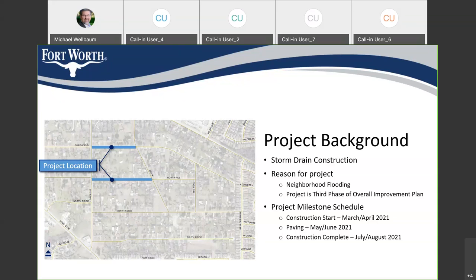This is a multi-phase, multi-year project, so we're not finished yet — we'll have another phase after this one. Tonight we're going to focus on just this part that's going into construction. We have a construction schedule that lasts 120 days. Right now we're planning to start right at the end of March — I show March or April for construction start date, depending on weather and getting all of the contracts signed and everything together, but it looks like we'll get started before the end of March.